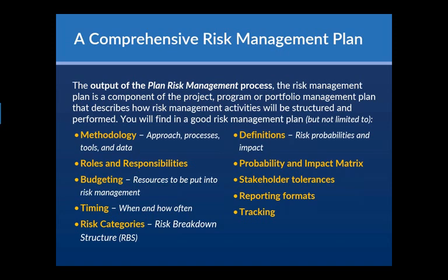Budgeting and timing. Are we going to need a special consideration in terms of money or time for doing risk management work? And that kind of links into your schedule, links into your budget, and it makes it so that you don't forget the little bits. Don't have time to go into too much around risk categories or risk breakdown structure, but it's like a representation of the types of risk or the categories of risk that might be in your project. Most organizations will keep a catalog of those so that it could be reused from project to project. A really good thing to keep in mind.